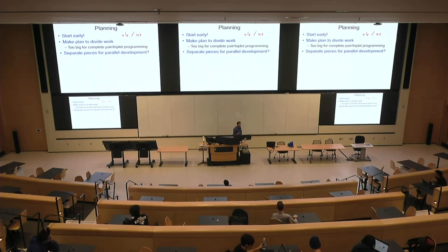In milestone 1, before we had functions written, we just stubbed them out. We just put in like an empty function, didn't do anything. So we can use this same kind of related idea to test our UI. We can just hard code a path. We can look at the street map data and just find a couple of street segments. We can write a little code to do this, find a couple of street segments that are connected and say, okay, that's our path, right?